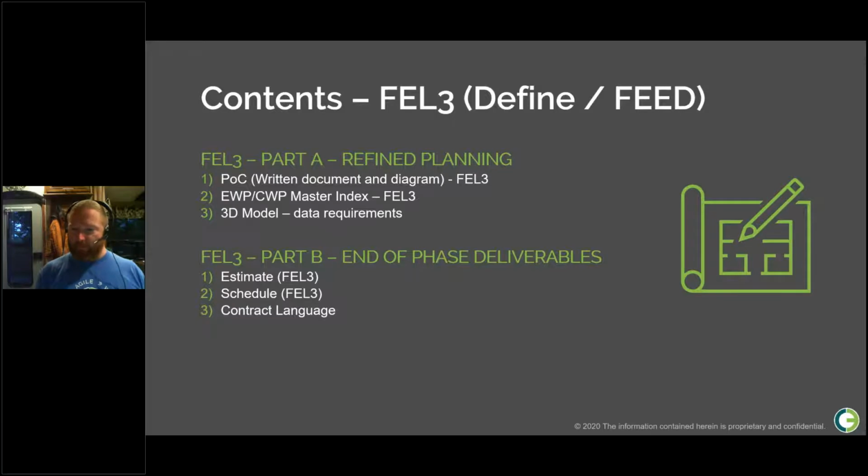You didn't know everything. But the reason to do it in FEL2 is to give you a starting point and to start looking at it in the right way. During FEL3, you're going to challenge all your assumptions. You're going to make sure that all the stakeholders have a voice. And you can finalize your plan by the end of the stage so that the engineers can meet your expectations during detailed design. Again, if you keep changing the plan during detailed design or having new great ideas, they might be good ideas, but they're likely going to cause a lot of churn.